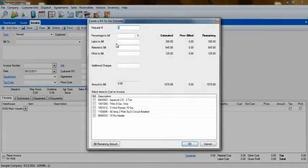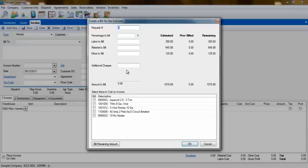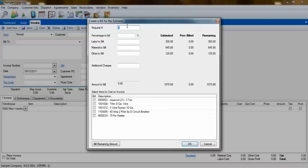You'll be presented with a pop-up that will help you to pull information from the quote to the invoice in segments. The request number will help you keep track of which stage of the bill you are about to generate. The percentage to bill option allows you to enter a percentage of the quote that you want to bill for.